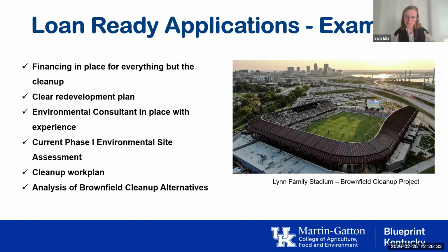So cleanup expenses, I do have to be clear, you cannot charge assessment expenses to a cleanup loan. EPA is very clear about that. No assessment money is eligible with cleanup loans. But Kiersten again showed you some great resources if you do need that assessment taken care of. And then if you need the cleanup taken care of, that's when you can approach folks like us or other revolving loan fund recipients.